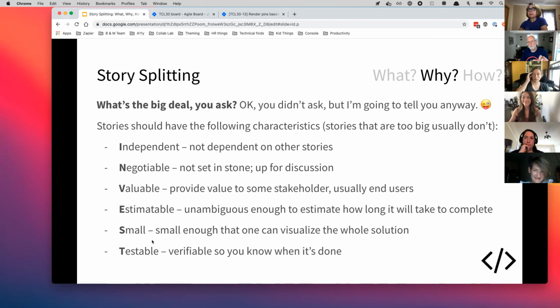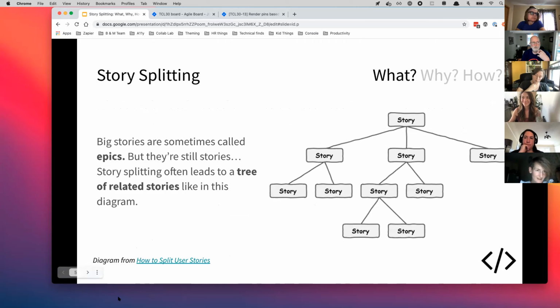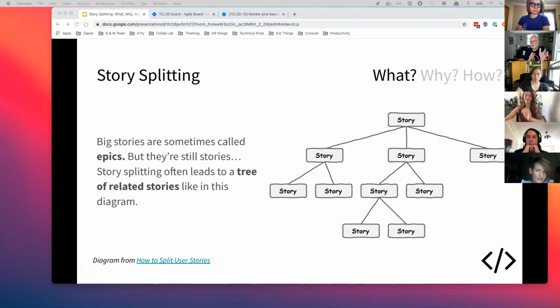I might just add, from your point on the last slide, about the right sizing thing. It's a really valuable tool for having the right conversations with your manager or the product manager. If you're into the story and you discover a bunch of scope, and you realize this is going to take more than 3 days, then you surface that to your manager. You let them know right away, hey, I found out that in order to get this thing done, I'm going to have to go into this other part of the system and do this other work. And then that's a point where you say, okay, let's split this story into 2 things: the one where you have to do this other work, and the thing that we originally thought you could do without that. It's sort of like the work in progress limits. It's a tool for you to have the right conversations and keep visibility into what you're doing.